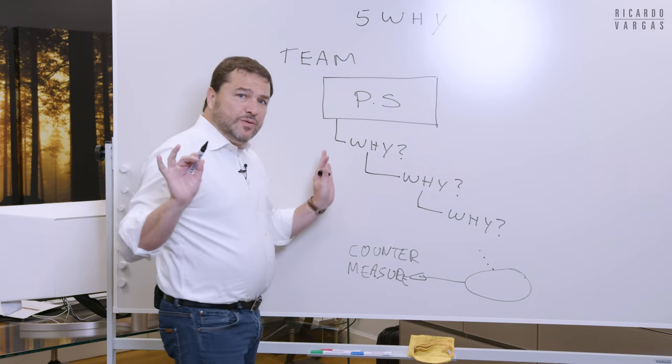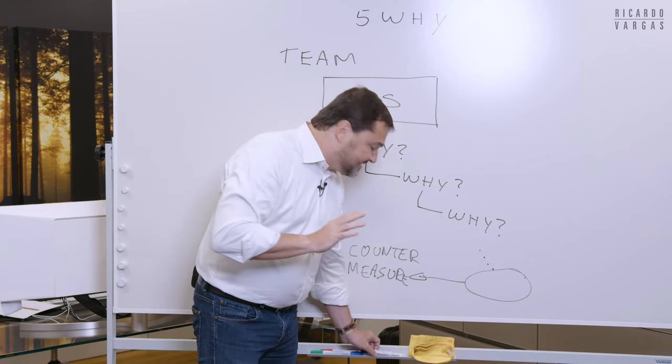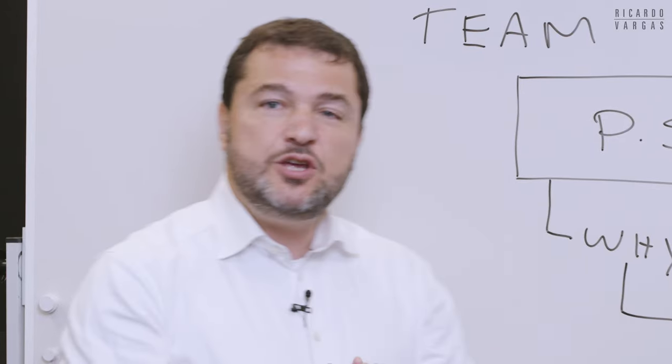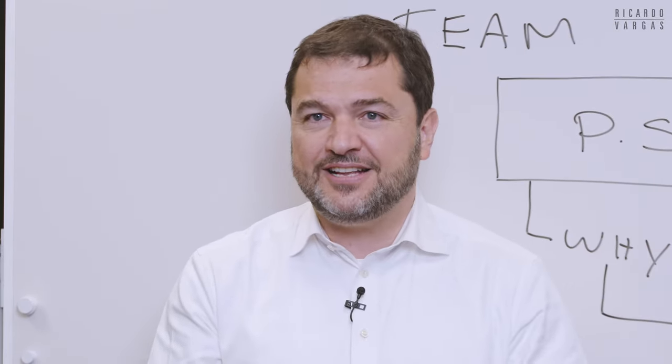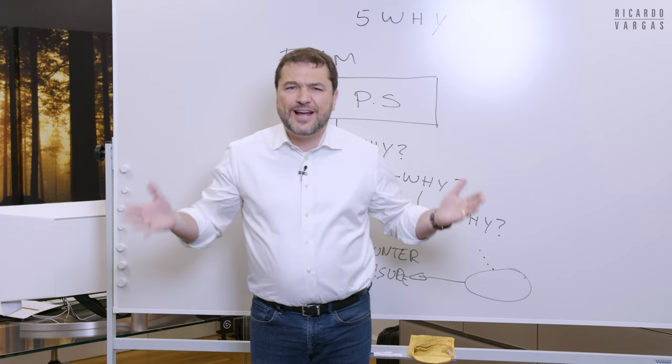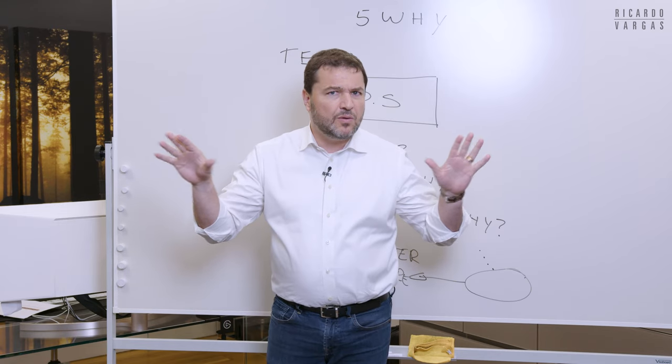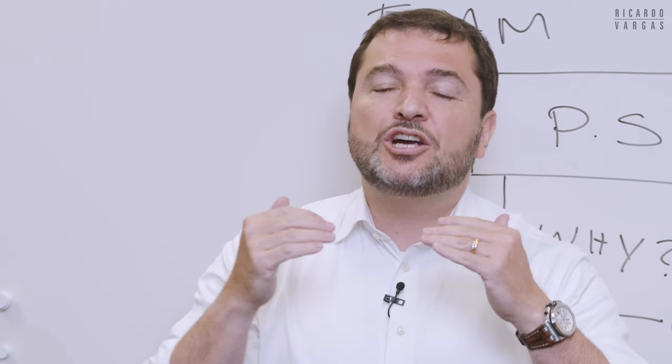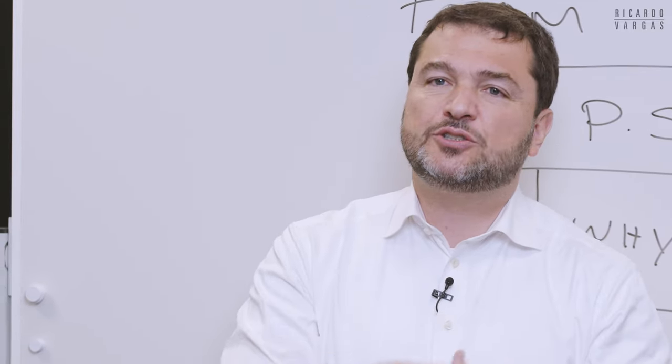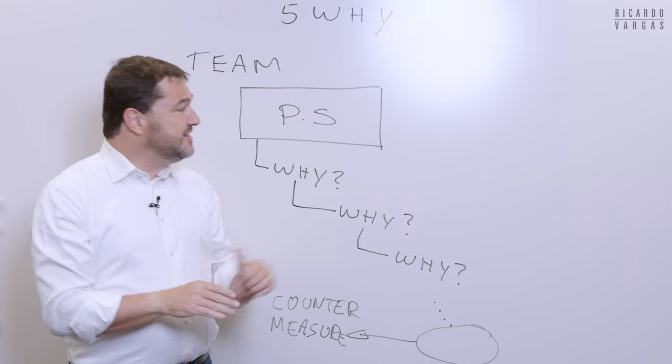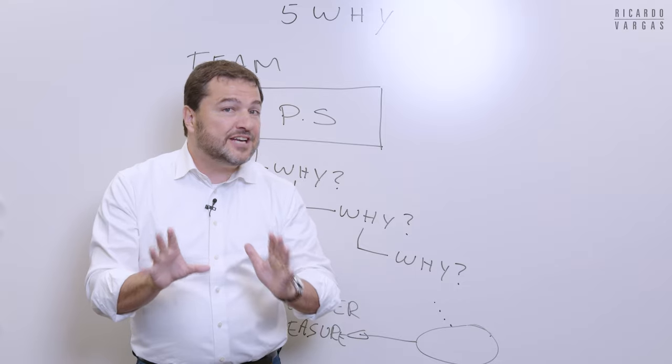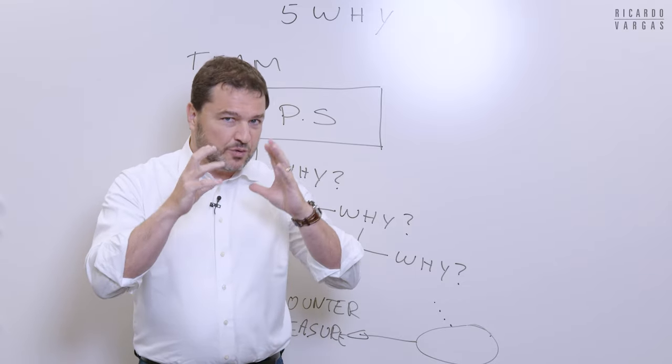The best way to explain this, let's take an example. You assemble your team and you want to discuss why people are not filling the risks in the risk register. Just a very simple thing. And then you say, why people are not filling the risk register. And then the first why is, it's taking a lot of time to access the risk system.